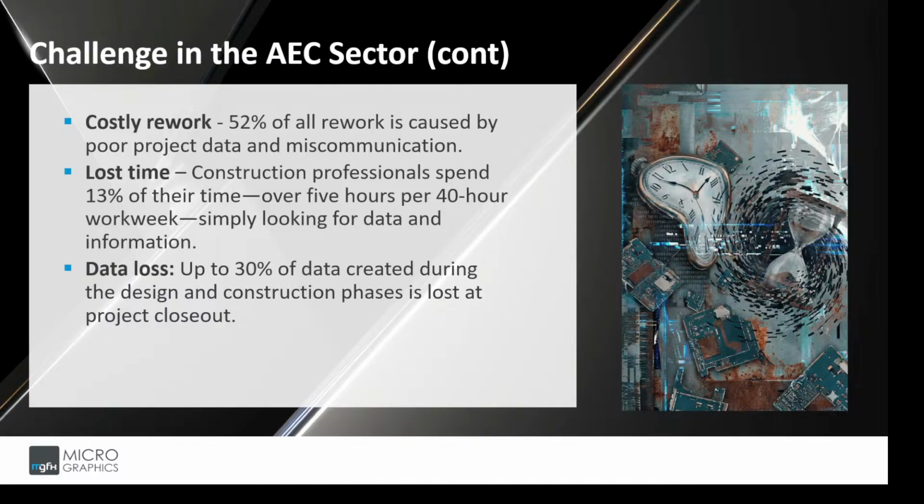Then we have data loss. Up to 30% of data created during the design and construction phase is lost at project closeout. And what this often leads to is challenges for facilities teams, especially in future when they want to do additions or renovations to their projects.